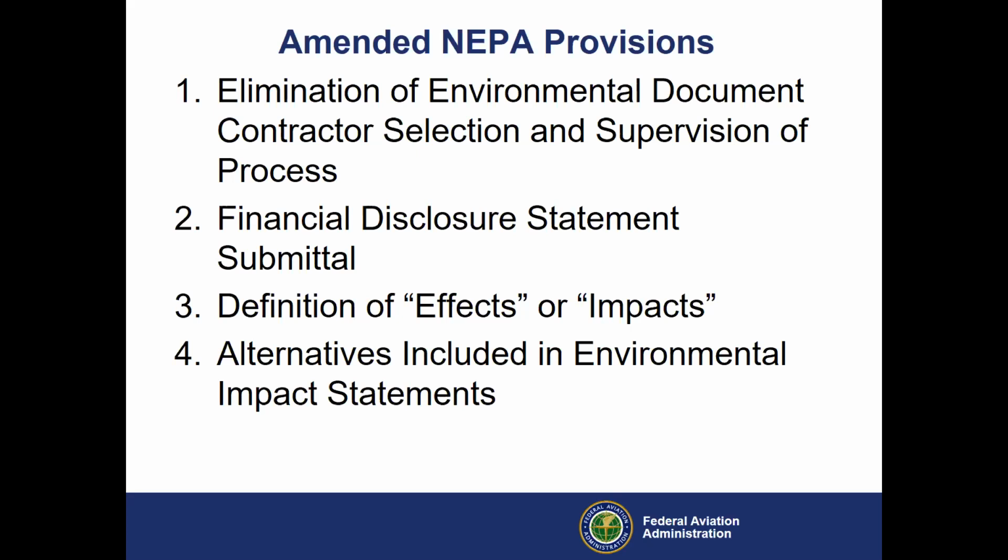So number two, the amended regulations require contractors or applicants preparing environmental assessments or environmental impact statements to submit a disclosure statement to the lead agency that specifies any financial or other interest in the outcome of the action. The requirement for disclosure statements in CEQ's prior regulations applied only to contractors preparing EISs.